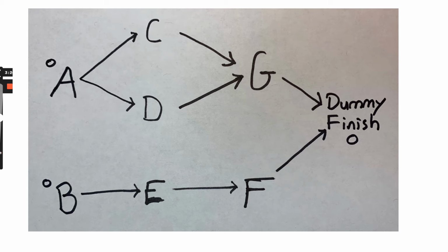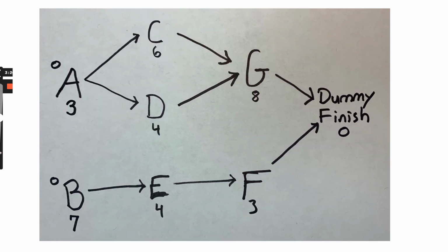Well, I'm not quite ready for my forward pass. First, I have to put in the times. Here's the duration of each of these activities. Make sure you use the normal time for your first mapping through. Do not use the crash time, because never do we crash every single activity, only the ones that make sense.